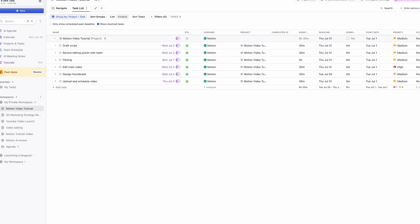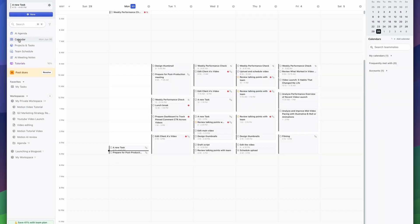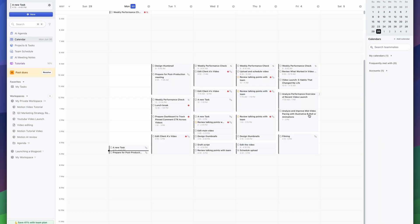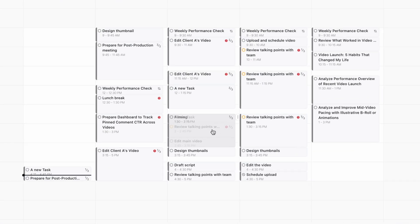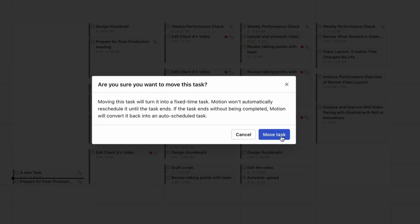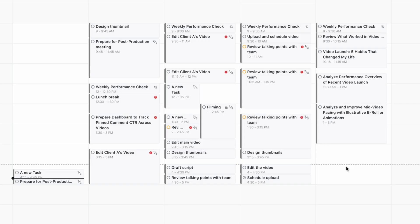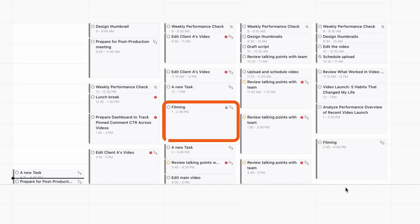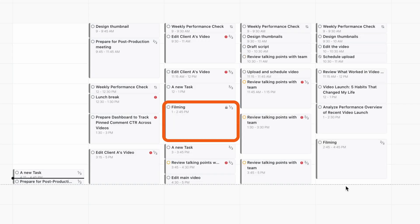Some tasks are flexible, like editing, while others are fixed, like the shoot date. I'll lock those down by pinning them within the calendar so Motion knows not to move them.